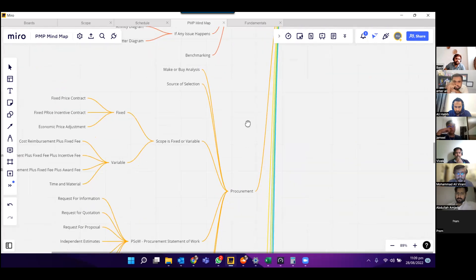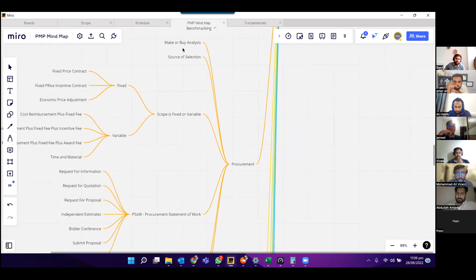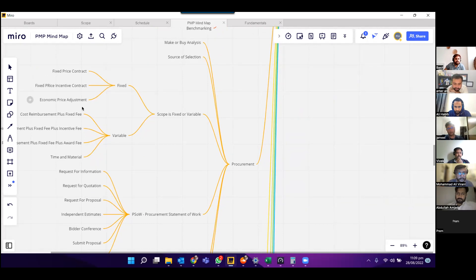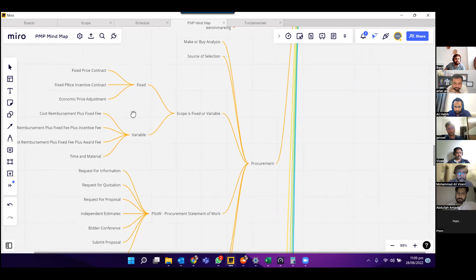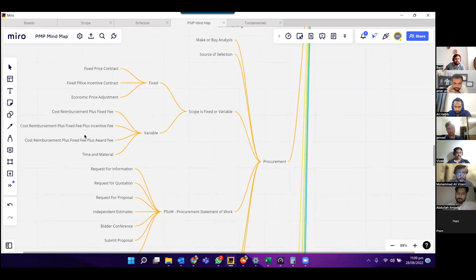Next is procurement. We discussed make-or-buy analysis and source selection. We discussed whether scope is fixed or variable. If fixed, we have fixed price contract, fixed price incentive contract, and economic price adjustment. If variable, we discussed cost reimbursement plus fixed fee, cost reimbursement plus incentive fee, cost reimbursement plus award fee, and time and material.